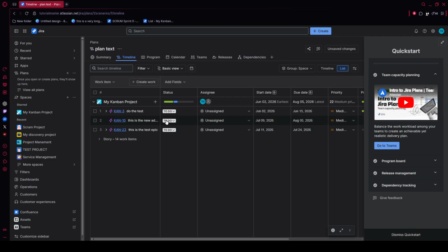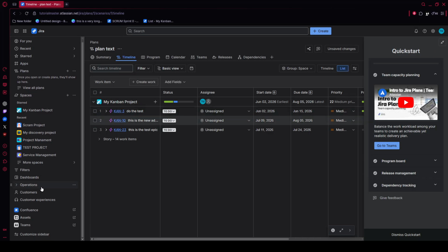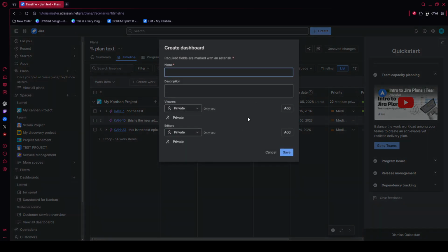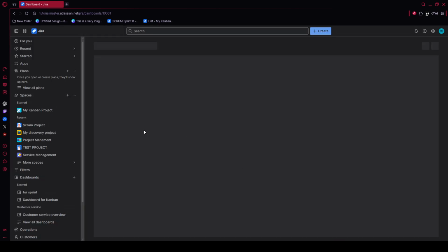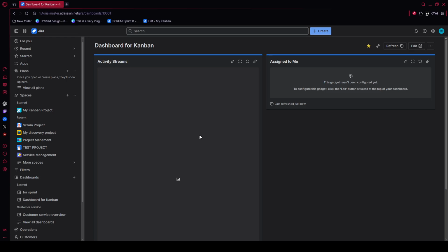If you need to fix an overload quickly, use the timeline directly. Click and drag the schedule bar for the overbooked item to a later point in the calendar, then release it. Jira recalculates availability in real time, which makes it easy to test adjustments without editing every issue manually.